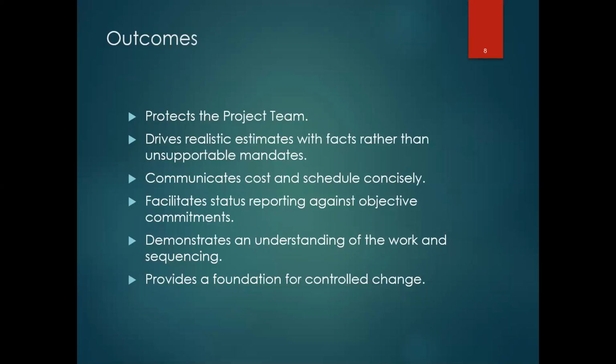Either your estimates are off, or a lot of times in estimates, you're just outright missing deliverables. And if you're familiar with the cone of uncertainty, if you look up the COCOMO model, C-O-C-O-M-O, there's a lot of discussion on it. If you're at the concept stages of the project, you can be off on your estimates by as much as 300%. So recognize where you are and only map out a PMP and a project schedule for what you do know. And that's kind of what we would call rolling wave scheduling.